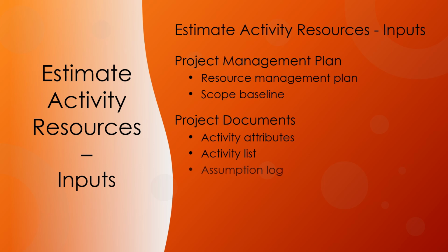The assumption log may have information on productivity factors, availability, cost estimates, and approaches to work that will influence the nature and number of team and physical resources. The cost of resources may impact resource selection from the quantity and skill level perspectives. A resource calendar identifies the working days, shifts, start and end of normal business hours, weekends, and public holidays when each specific resource is available.